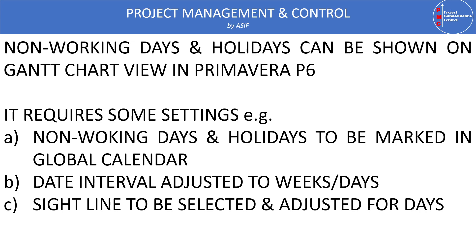Non-working days and holidays can be shown on the Gantt chart in P6. To show them, we need to make some settings. The most important setting is the calendar, which is a very important feature of Primavera P6 and affects many calculations. We need to mark weekly holidays and non-working days in the global calendar. We also need to set the date interval to week and days, and set the sight lines to be adjusted for days. Most importantly, non-working days and holidays must be marked in the global calendar.